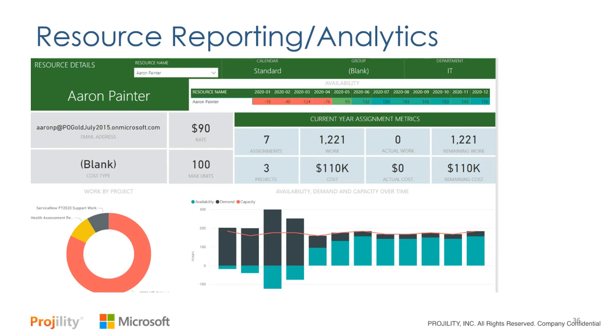As we look at the chart at the top, we can see for the first 4 months of the year, he's over capacity. Then we go down. So we may want to look at a different resource with the same skills that's under capacity that we can switch out, and figure out which of Aaron's tasks could be best done by a different individual, whether it's project or non-project activities, help desk activities, Agile or Waterfall work.